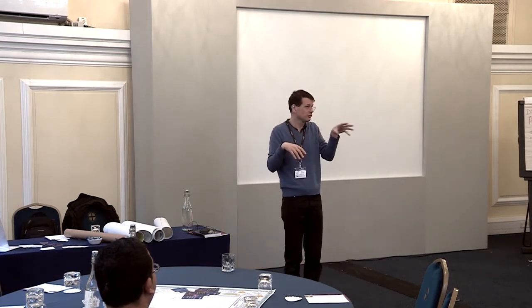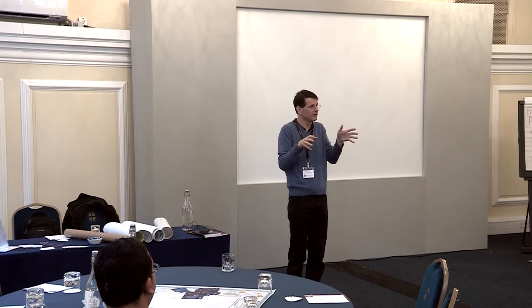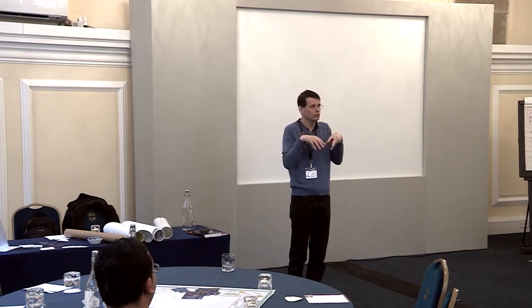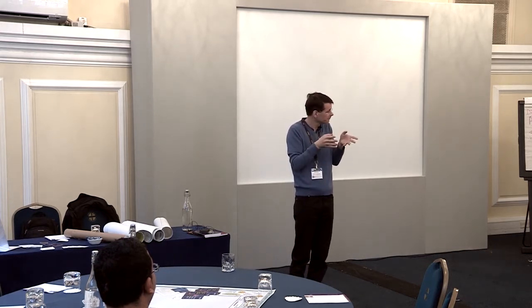The sheet, which I call T4, picks up where the others leave off and says, what were your action items from the last retrospective? Have you done them? What has changed, etc., etc. The main sheet, which I see teams use most of the time, is a sprint retrospective sheet. So that just assumes you've done a sprint, be it 2 weeks, 1 week, 4 weeks, whatever. And the language on the sheet talks about the sprint period.